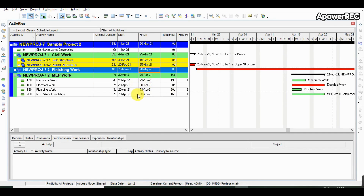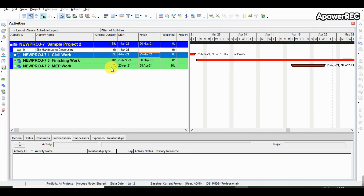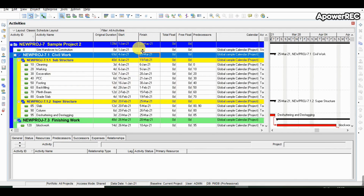All practical considerations through the features of relationship and lag in Primavera have been applied, and the best possible completion date that can be arrived at is 20th May. This is the schedule in which we have utilized the features of Primavera and implemented scheduling techniques to prepare a feasible program which can give direction to management and the team for the execution of work. However, it is still not completed because we haven't allocated resources and cost, which is the 5-point schedule that can be a single document to control the project.